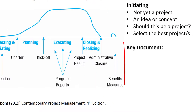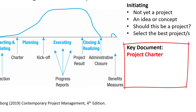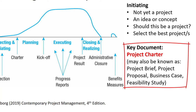A project charter is the key document used to pitch the project. Sometimes this is called a project proposal, project brief, business case, or feasibility study. Within this stage, projects are researched and the project charter is a high-level brief about the project and why it should exist. The project charter is assessed usually by a senior leader, project board, a client, or even a project management office. If the project is formally approved, it will be considered an official project and progress to stage 2.